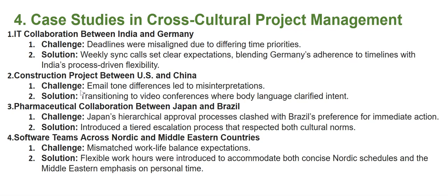Construction project between US and China. The challenge here, email tone differences led to misinterpretation. Solution resolution for that: transitioning to video conferences where body language clarified intent. We have pharmaceutical collaboration between Japan and Brazil. The challenge here, Japan's hierarchical approval processes clashed with Brazil's preference for immediate action. Solution resolution for that is to introduce a tiered escalation process that respected both cultural norms.